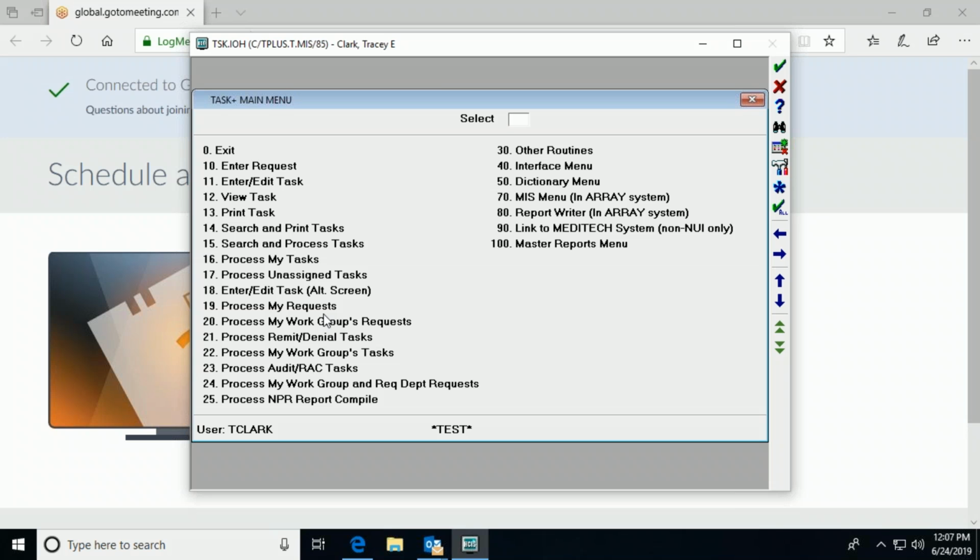Yeah. I'm also going to mention customs. Do you guys have any customs? Some, yes. Okay. My advice, as an old Meditech IT manager from a long time ago, is go out and get that list of customs off Meditech's website for your hospital, sort them by module, and make them available to everybody. Because sometimes customs have been around so long, people forget that they're customs, and then it's some of your most fragile code, and it's likely to break.